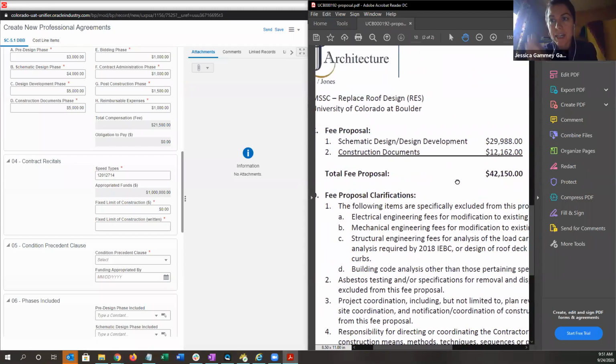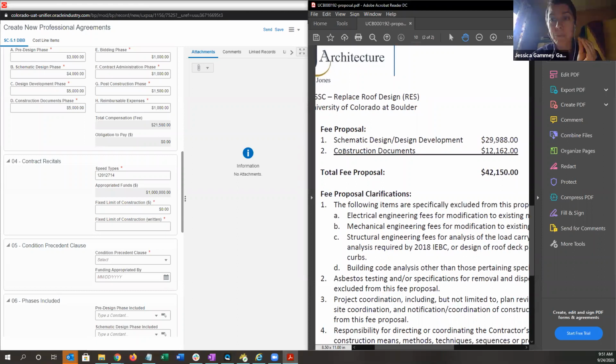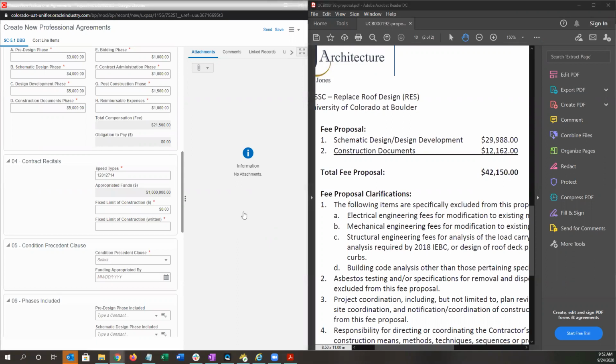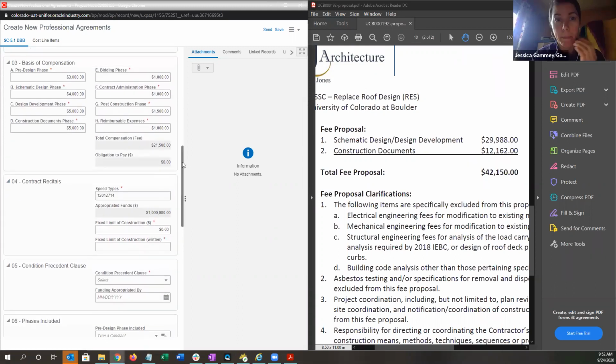My previous comment way at the top was talking about the life cycle of cost code allocation with design. When we first get a contract, we set the design budget as a sum. Then when we get a proposal from an AE, we go in and allocate that cost code according to the design fee table that's in their proposal. Now our cost code allocation is updated so that we can enter the agreement. And then if there's an amendment or another proposal from an AE, we go in again and update that cost code allocation. That is the key part to doing a successful amendment. Correct.